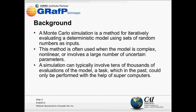Monte Carlo simulation, as shown here, is a method to iteratively evaluate a deterministic model using random numbers as inputs. It's particularly useful when the model is nonlinear and involves a very large number of uncertain parameters.